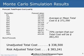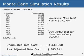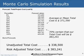Remember, we started with our best guess of $338,500. Now, if I want to be 70% certain as to what the final cost will be — because things change: people change their mind, change their requirements, there's uncertainty — we try to build in a management reserve, or contingency reserve, for risk and unknown events. The difference between $338,500 and $383,241 is our management reserve. So what we ask for in the budget for the whole project is $383,241.